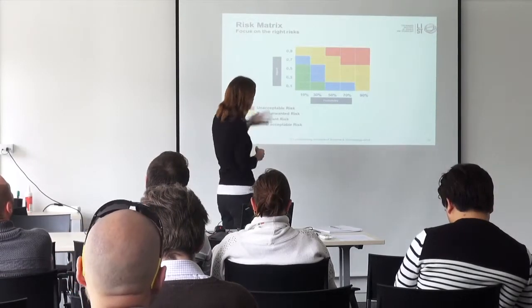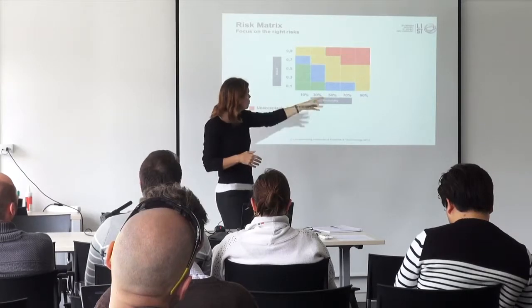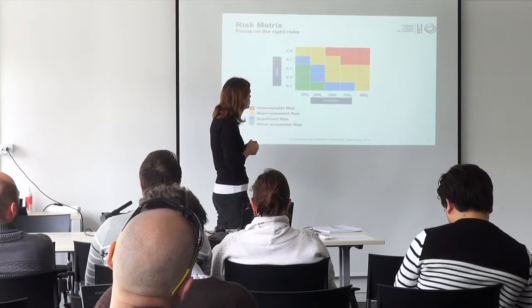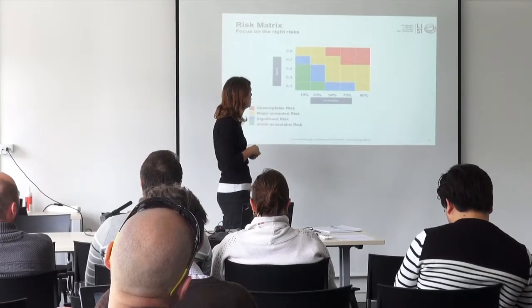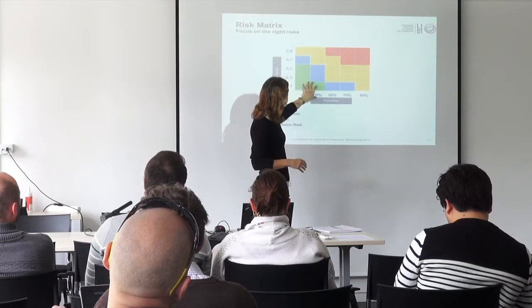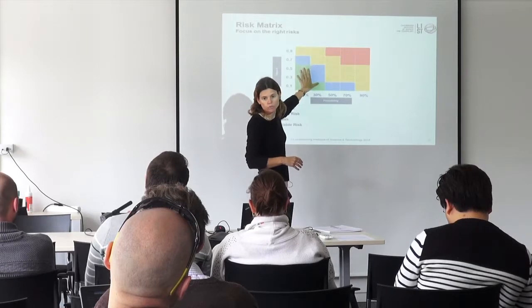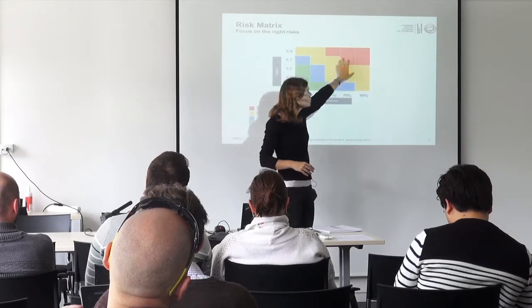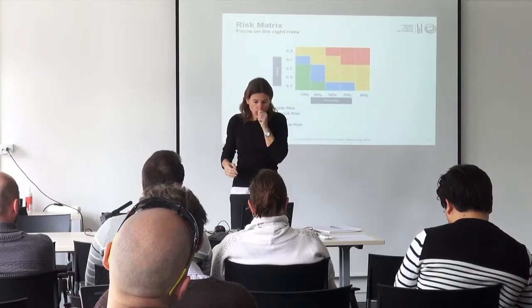You can have that same kind of matrix, but with percentages and more cells. But it's always the same. You need to identify the cells where you say this is acceptable and the ones that are not acceptable.